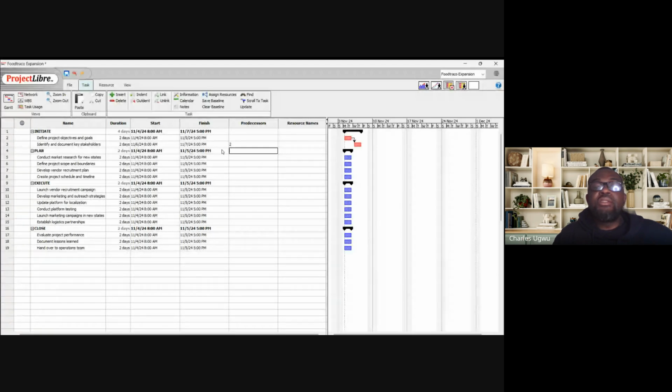Okay. Then the next is to conduct market research for new states. When is that going to start? Immediately we finish identifying and documenting key stakeholders, we can start number 5. So from number 4, we get to number 5. And remember that number 4 here is plan, a stage.